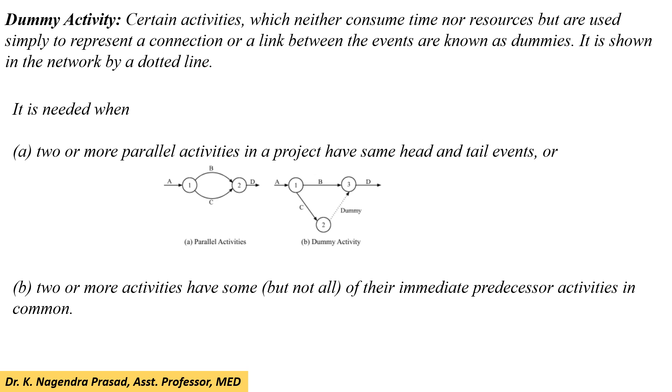Dummy activities are needed in two situations. First, two or more parallel activities in a project have the same head and tail events. Second situation, two or more activities have some of their immediate predecessor activities in common.